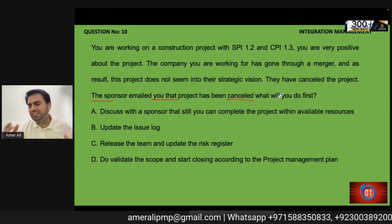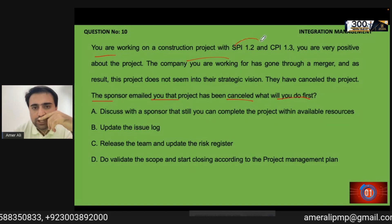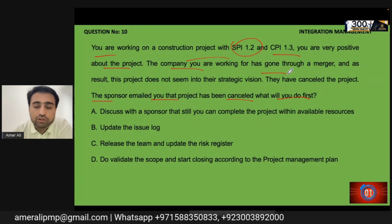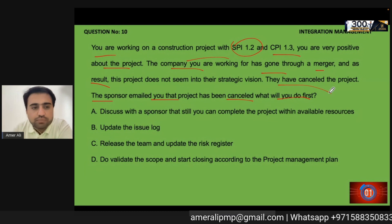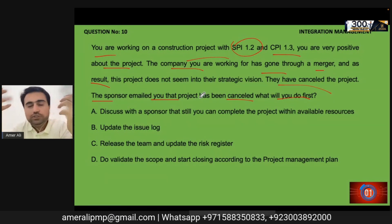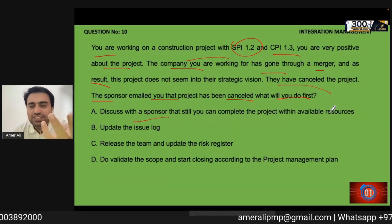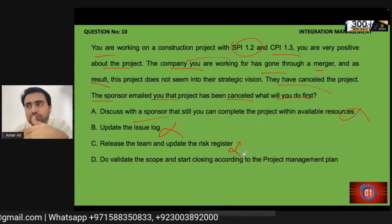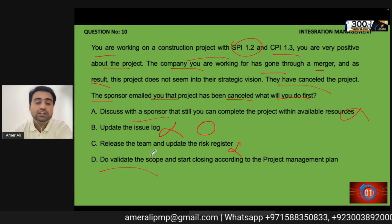Last question: The sponsor emails you that the project has been cancelled. You are working on a construction project with SPI 1.2 and CPI 1.3 — you are doing well. But the company has gone through a merger and the project is no longer aligned with their strategic vision. What do you do? Discussing with the sponsor to continue is useless since it is not in the strategic vision. Updating the issue log or risk register is not the priority. Once cancelled, you validate the scope to ensure payment for completed work, then start closing the project.